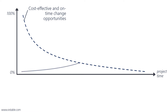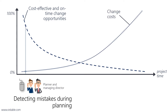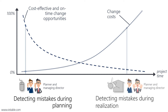This is especially true for changes to digital models — these changes are easy. Change costs increase over the course of the project. If errors are detected earlier, change costs are lower. It is easy to correct an error in the model, but if an error is detected later — for example during realization on the construction site — the follow-up costs are very high. These follow-up costs are not only due to parts of the factory having to be re-planned and remanufactured.